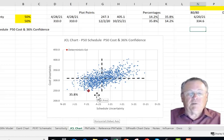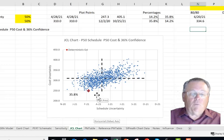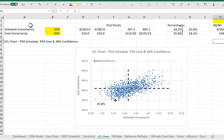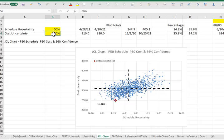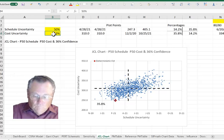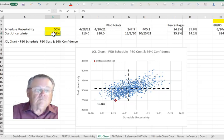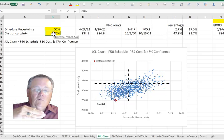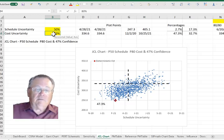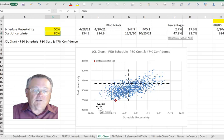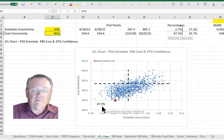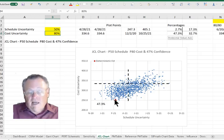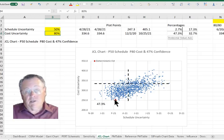However, the boss may say, look, I need more than a 35% probability of achieving the goal. What if I was willing to increase my cost here, let's say to 80%? So now my black line moves up a bit and my confidence level has increased now to 47.3%. But now I'm still concerned about my confidence level. The government actually likes to have 70%, I believe.